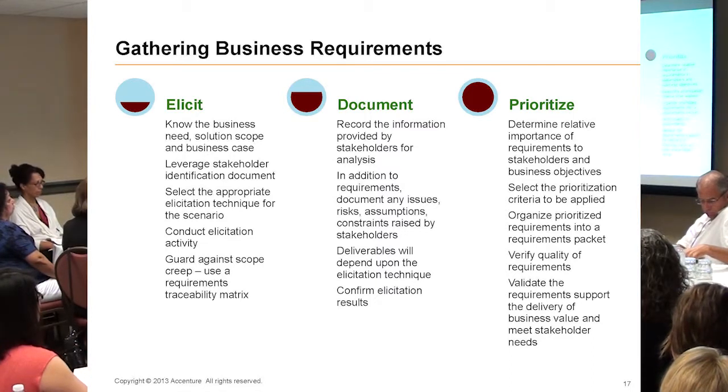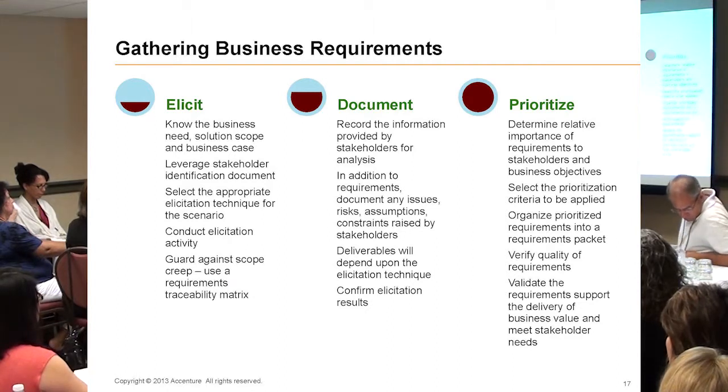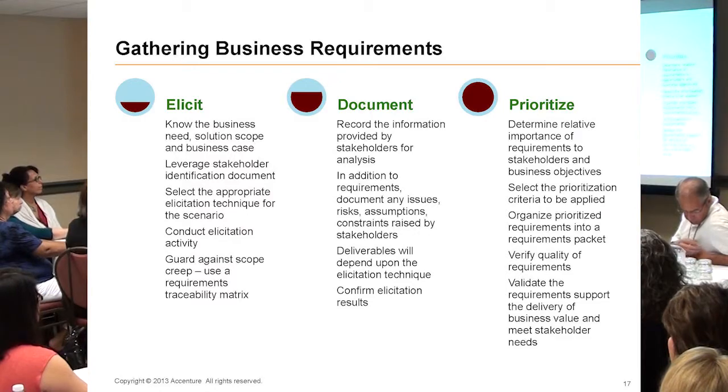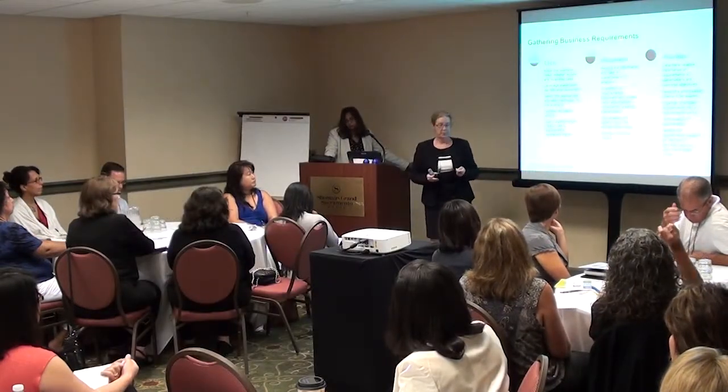And all the time, even though you're the business analyst, you need to be thinking, putting on the hat that the project manager has, which is don't be doing scope creep. If you're bringing something forward as a good business analyst, and you're saying this is something we really need to consider, before you take it forward for a change order, be sure that it is actually a requirement and not just a nice to have thing. Project managers have hard jobs.